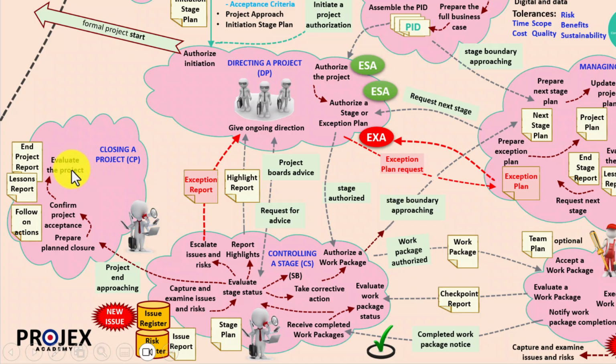Then evaluate the project, which is looking back over your shoulder and saying, so how did we do? Do you remember the PID that was signed off back in initiating a project? Well, every time we get to an end stage, we'll not only look at the baseline version at this point, but also the updated baseline version as we go through each end stage assessment. So here, evaluating the project will look back at aspects such as this, and it provides the complete history of what happened throughout the project. This isn't an opportunity for the project manager to be horsewhipped, but merely just the facts.